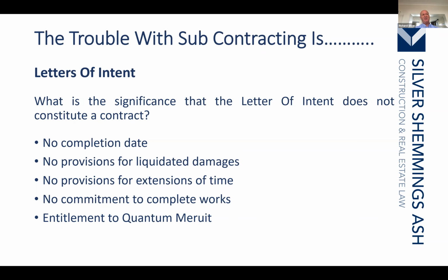What we've identified is that the invitation to tender and what was intended to be the contract was very onerous, and that every risk was passed down to the subcontractor. The subcontractor, when tendering in the 2-week period they had, failed to pick up all these points and hadn't priced for them. So all these delays and additional costs would be down to the subcontractor if there was a contract in place.